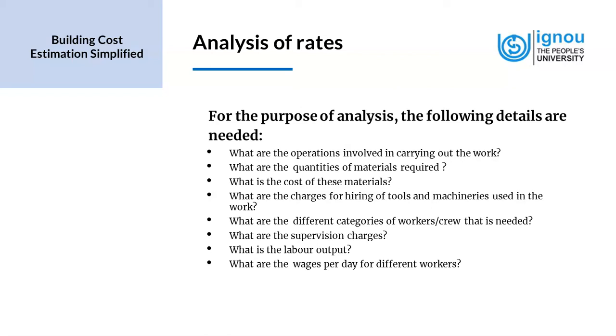So we need to know what are the wages per day for different workers. Usually, these are published by the government in standard form, and it can vary from location to location, cities to cities, depending on the availability of the laborers, the level of skill that the workers have, etc. So this is also an important aspect that we need when we are doing the analysis of rates.